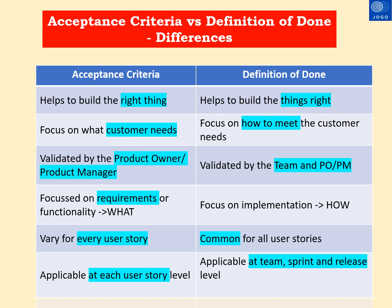Acceptance criteria is focused at each user story level, while the definition of done is focused across all user stories. Acceptance criteria is applicable at each user story level, whereas the definition of done can be defined at the team level, sprint level, and the release level. These are the key differences between acceptance criteria and definition of done.